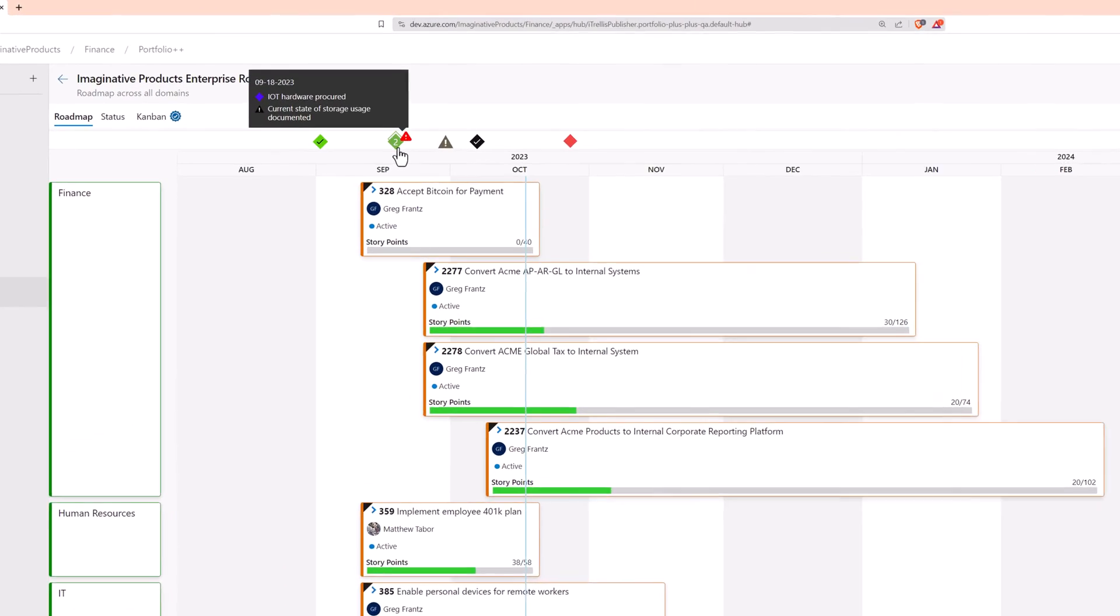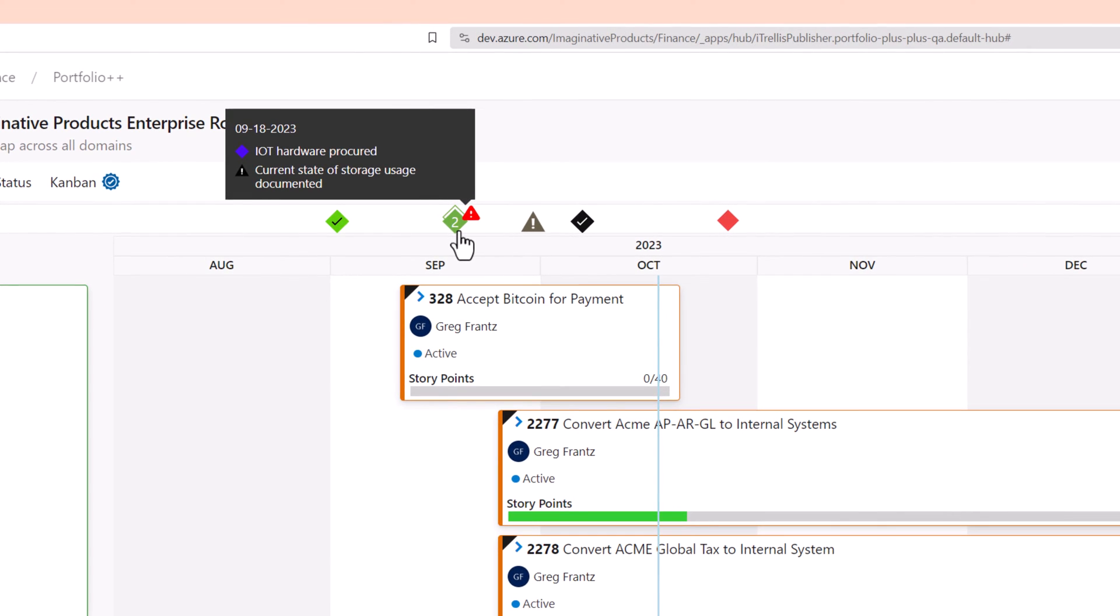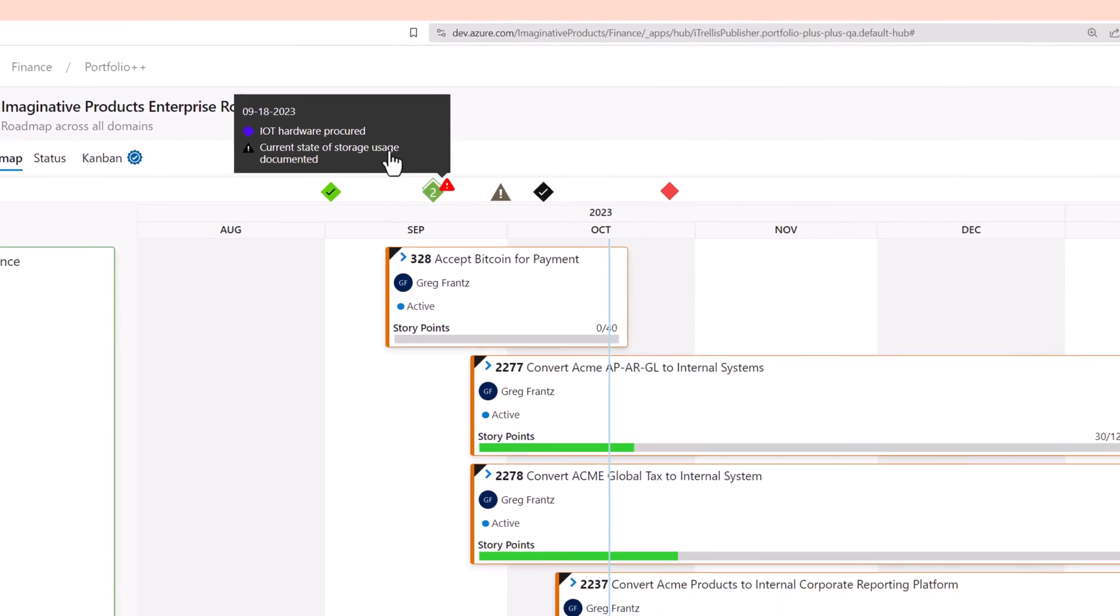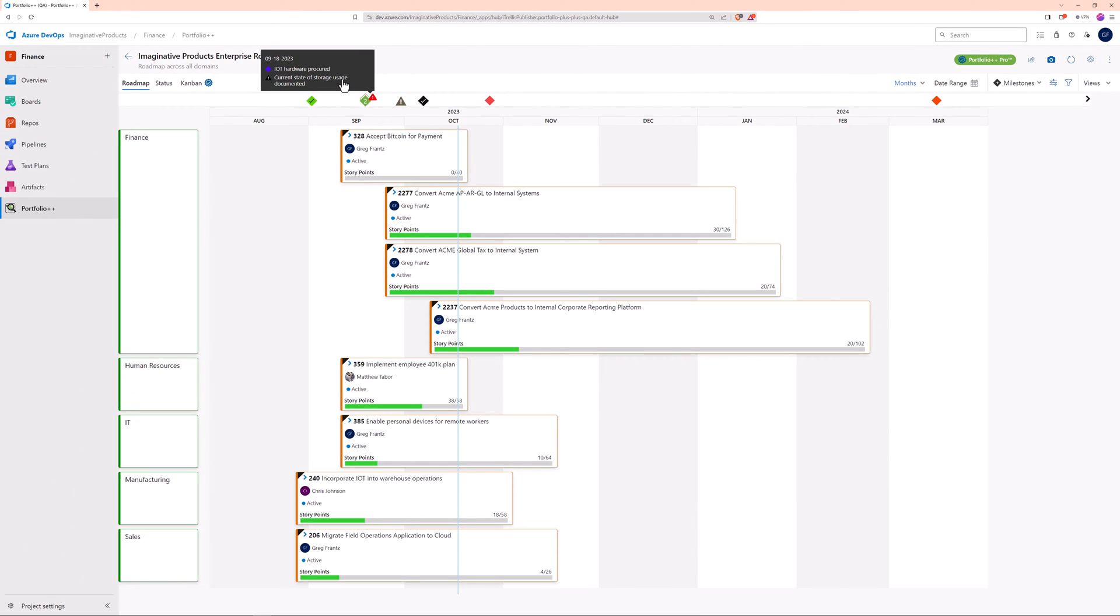Notice this special indicator. Since both milestones share the same date, this light green icon is used to represent the pair of milestones. We also see that there is an exclamation mark. Again, this is because the milestone date has passed and the linked work item is still active.